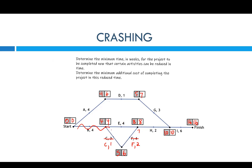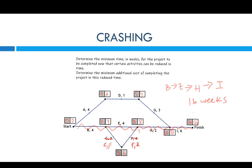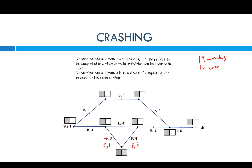The new critical path is this straight line going this way. The new critical path is now B, E, H, and I, giving me 16 weeks. Before it was 19 — now it is 16. When we reduced C and F by two weeks each, because they were on that critical path, we got down to 16 weeks.